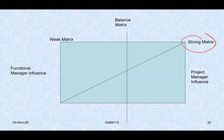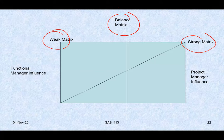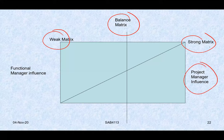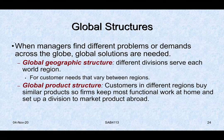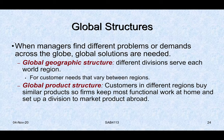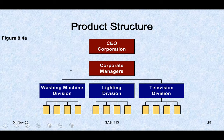From the matrix structure comes the terminology of strong matrix, weak matrix, and balanced matrix. A balanced matrix is what we ideally want. When the project manager has more influence, it's called a strong matrix. When the functional manager is more dominant, it's called a weak matrix. Sometimes organizational structures are also designed geographically or by product — for example, a global organization like Samsung or Panasonic may divide by product divisions: washing machines, lighting, televisions, smartphones.